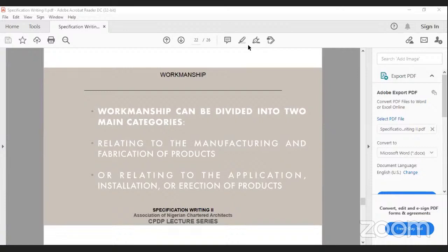We just take a product in its natural phase, and then we apply it, we specify it. And then when we get to site, we find out that for you to install one porcelain tile, you probably will need a waterproofing expert, depending on where you are doing the installation.